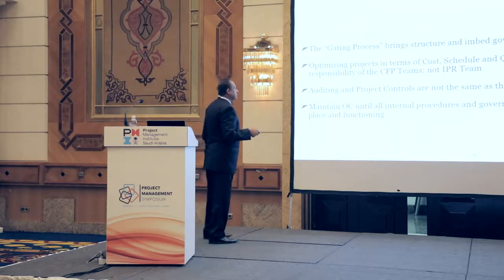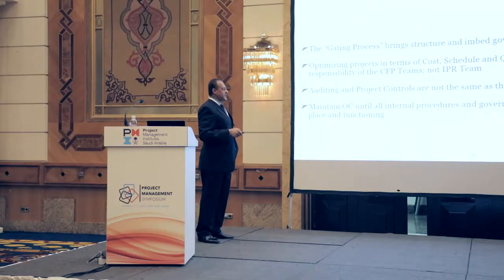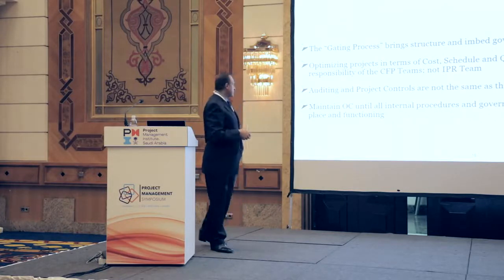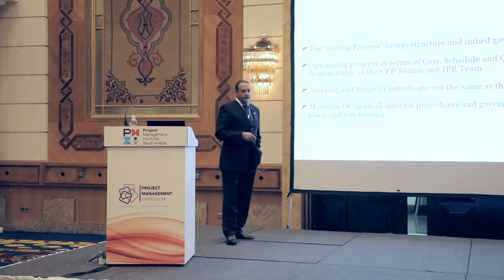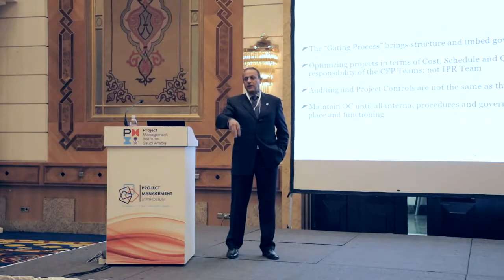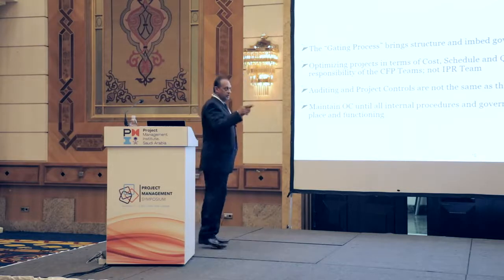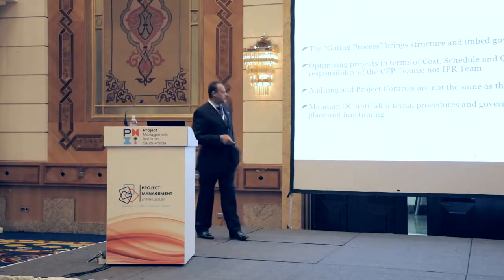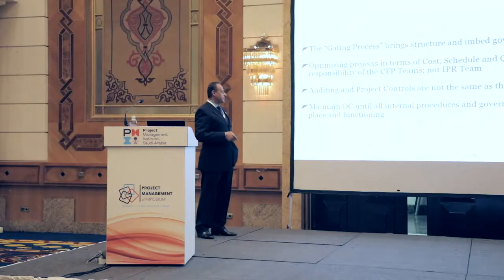Auditing project controls is not the same as the independent project team. These are different. Auditing is a PMO, Project Management Office, responsibility. Audit is basically ensuring that you follow procedures. Maintain the oversight committee when you are implementing this journey, all the way until these processes are well structured in your corporation, to make sure you reach your goal of meeting the performance you set out to meet.